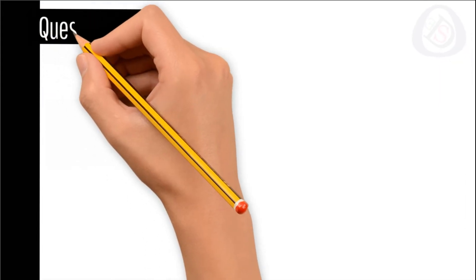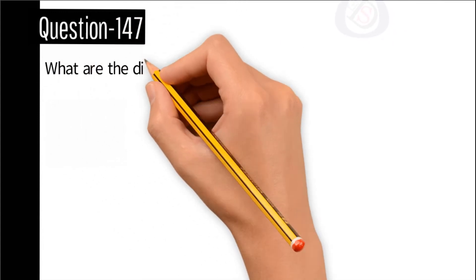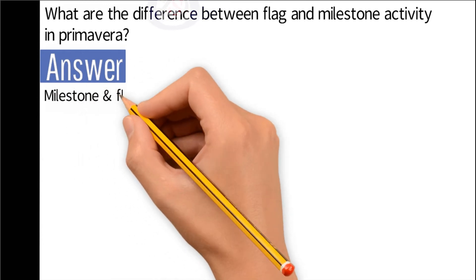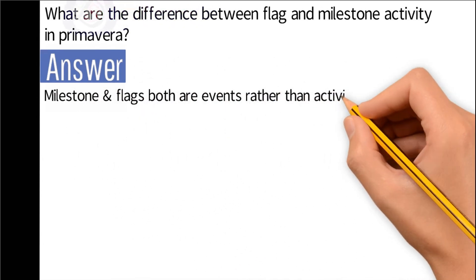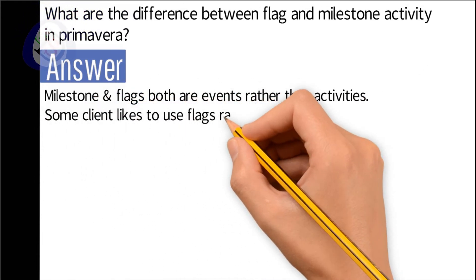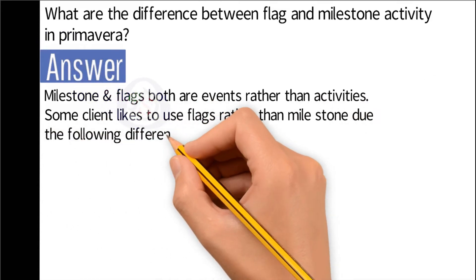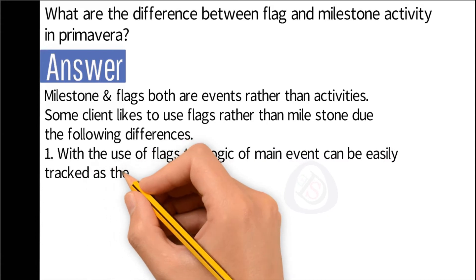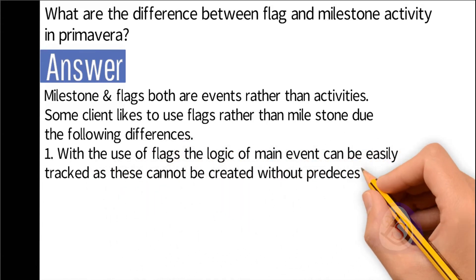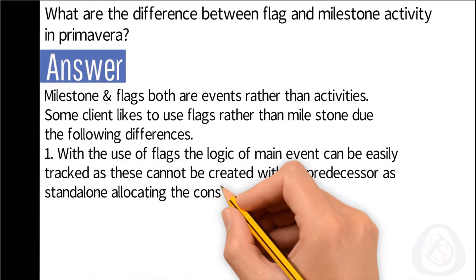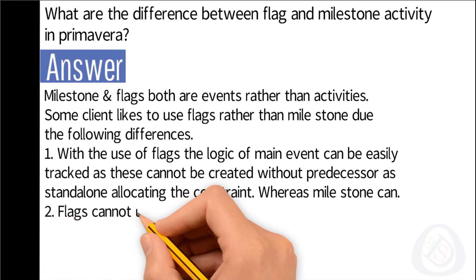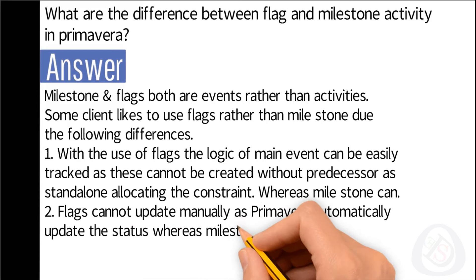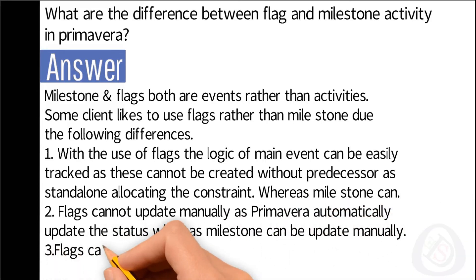Question number 147: What are the differences between flag and milestone activity in Primavera? Answer: Milestone and flags both are events rather than activities. Some clients like to use flags rather than milestone due to the following differences: One, with the use of flags the logic of main event can be easily tracked as these cannot be created without predecessor as standalone allocating the constraint, whereas milestone can. Two, flags cannot update manually as Primavera automatically updates the status, whereas milestone can be updated manually. Three, flags cannot be constrained, only driven by predecessor, whereas milestone can.